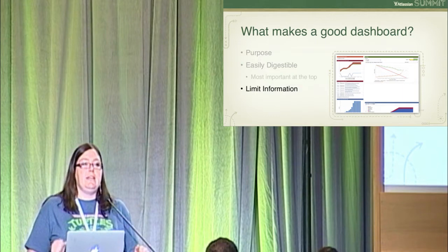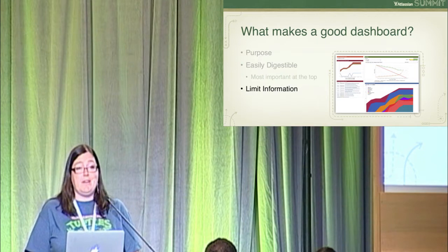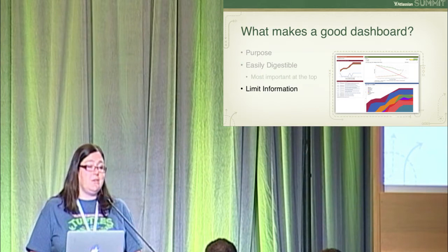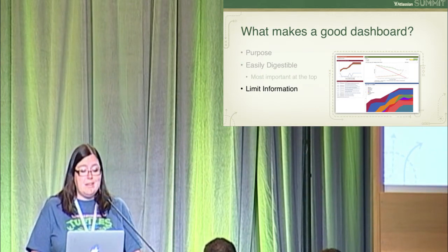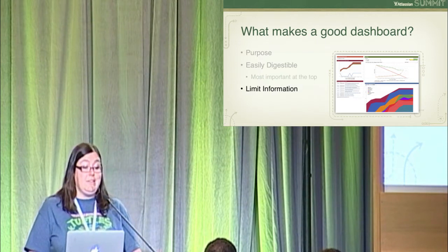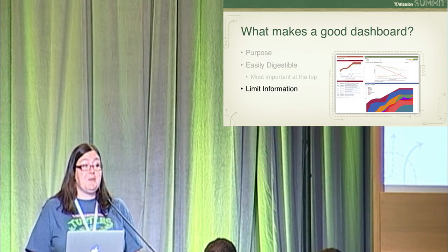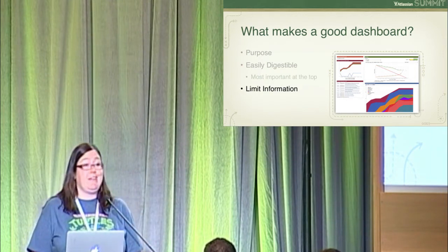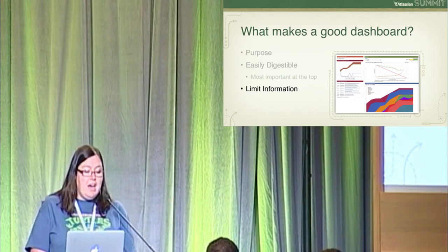And most importantly, limit your information. Information overload will kill your dashboards. Don't put every bit of data that you can think of to pull. Filters that you don't need to see every day don't necessarily need to live on your dashboards. And gadgets that don't add direct value to your process or purpose don't need to make the cut. Actually, when I started this presentation, I had 2 filters on there that I couldn't really figure out how to make slides for, and I talked to my teams, and they're like, yeah, we don't use them. So even that, I had to kill them.